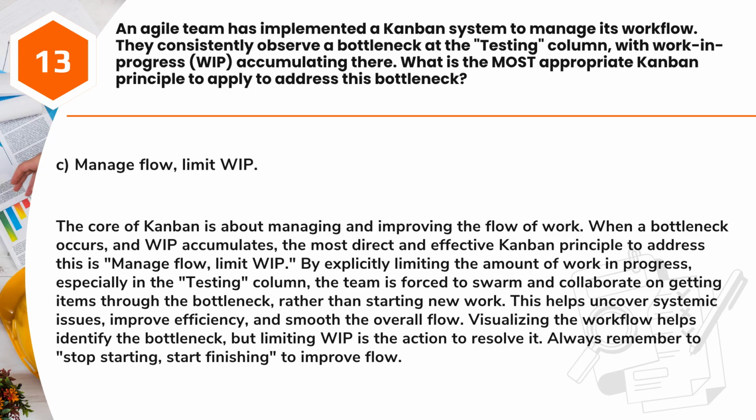Visualizing the workflow helps identify the bottleneck, but limiting WIP is the action to resolve it. Always remember to stop starting, start finishing to improve flow.